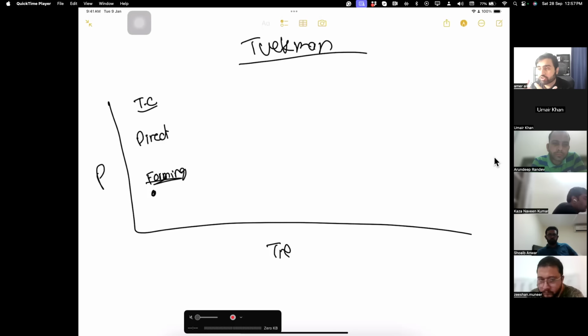When the team starts growing, they start having conflict. I call it the storming stage. Okay, storming is that now we're having conflict. Now the productivity decreases. You need to use active listening, emotional intelligence, and handle conflict here. Very critical stage. If you handle conflict well, it moves to the norming stage.